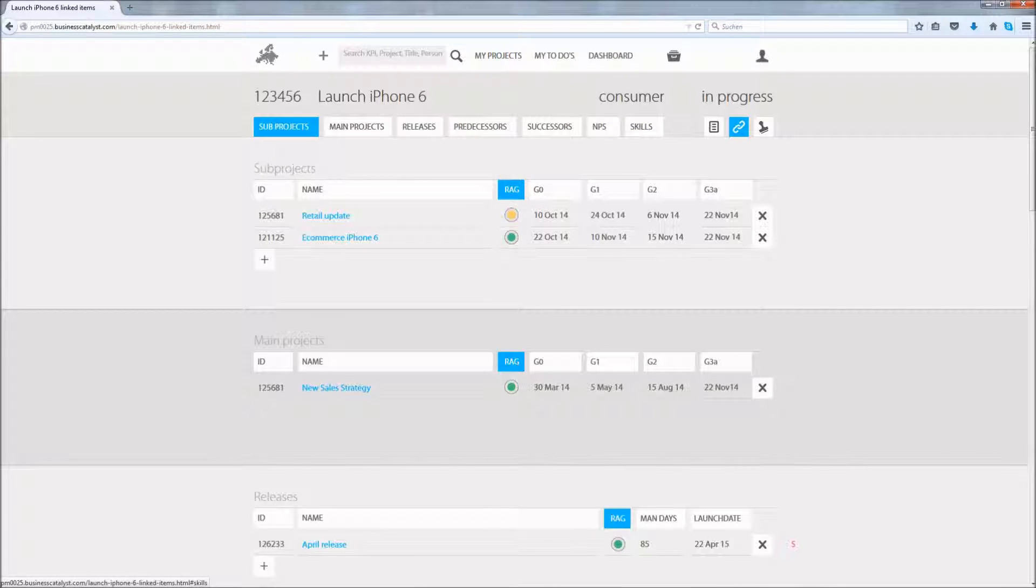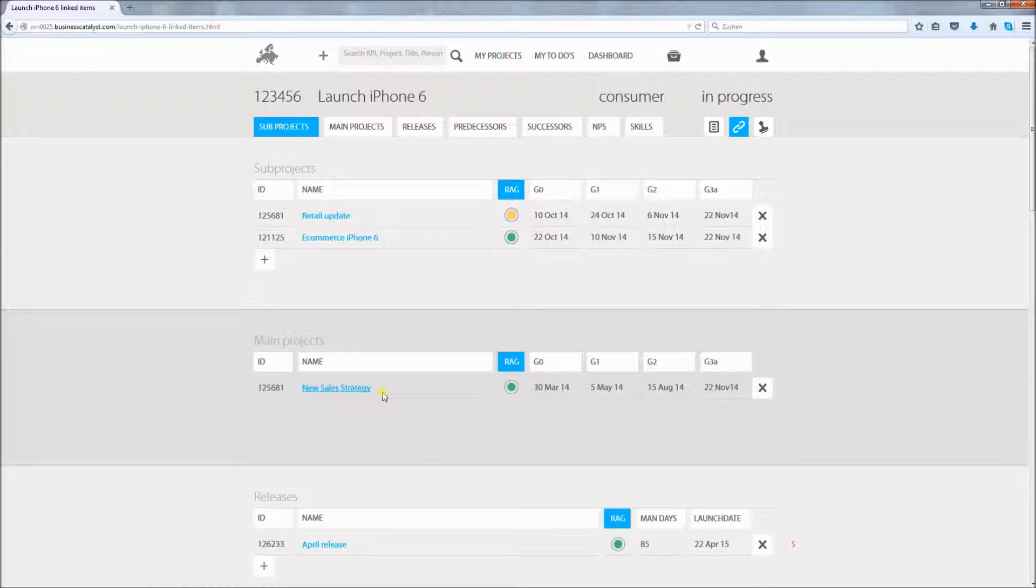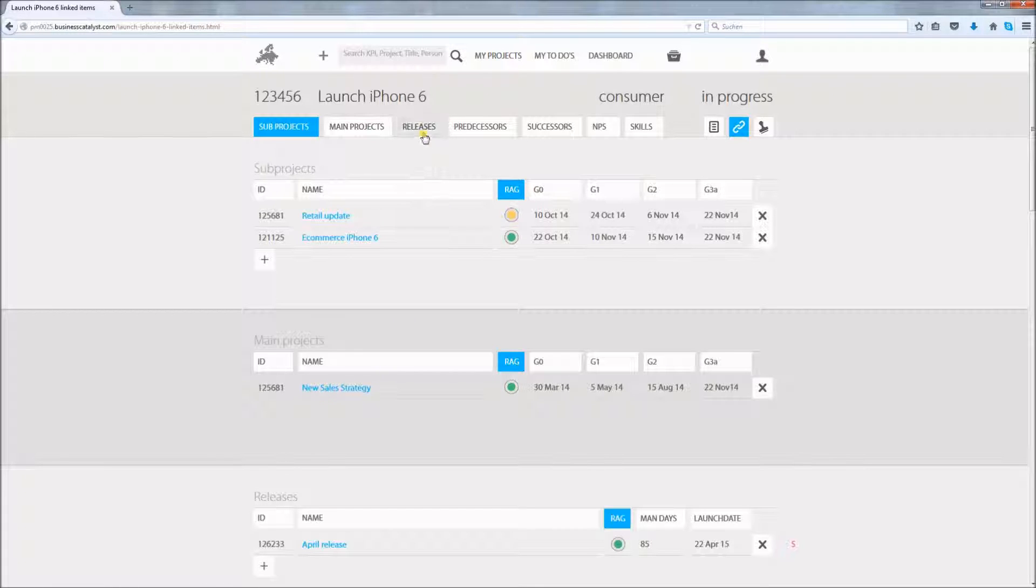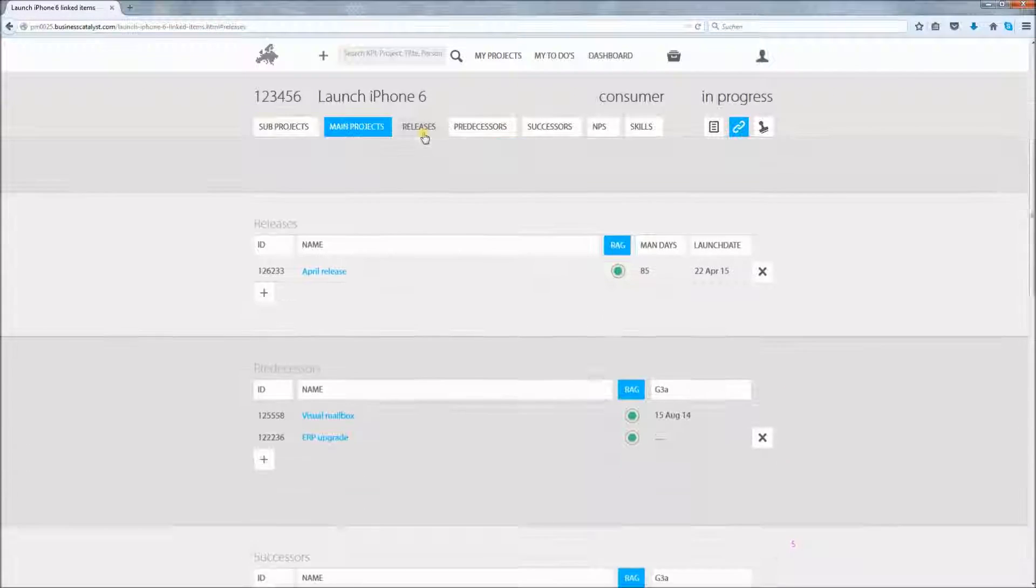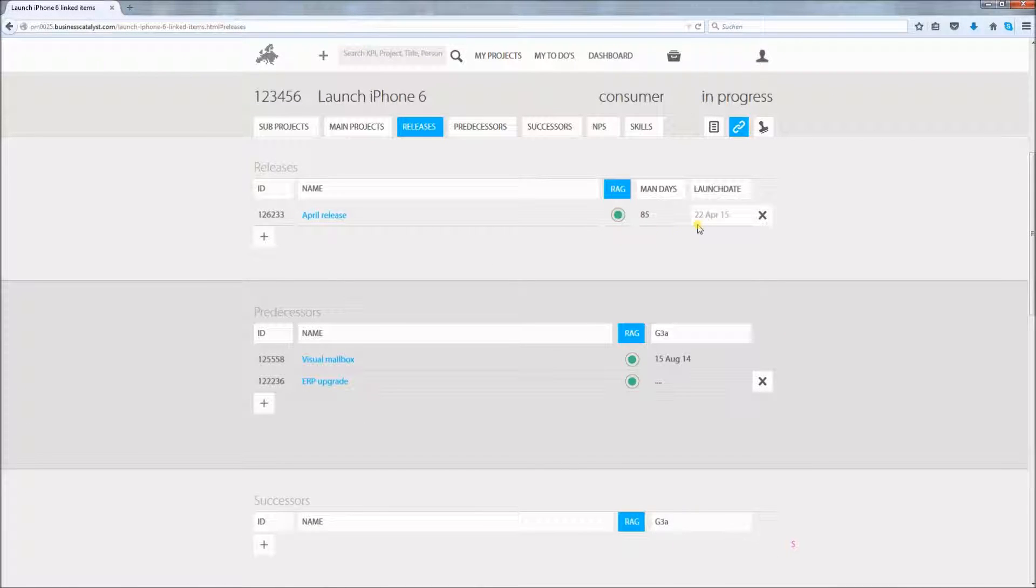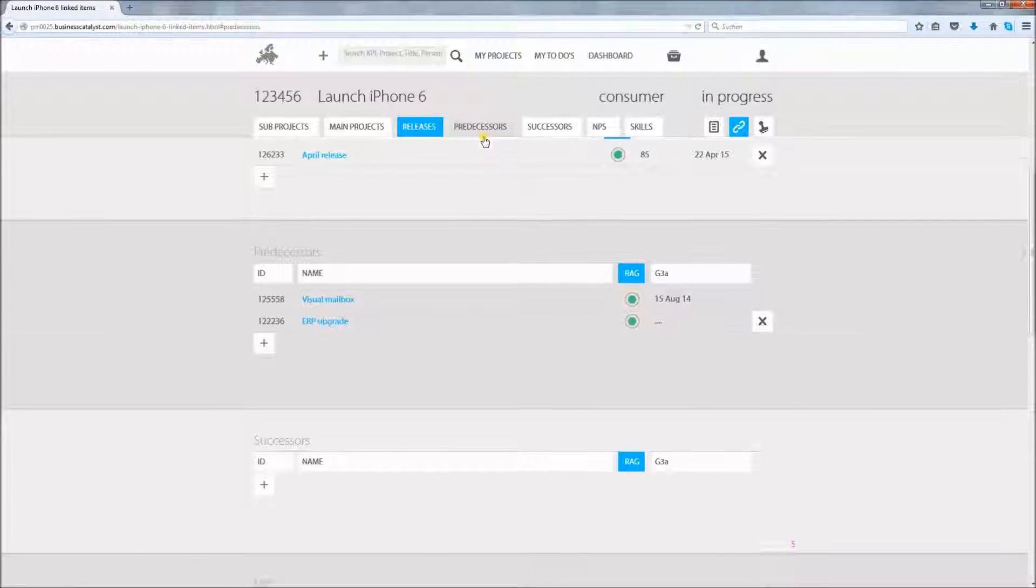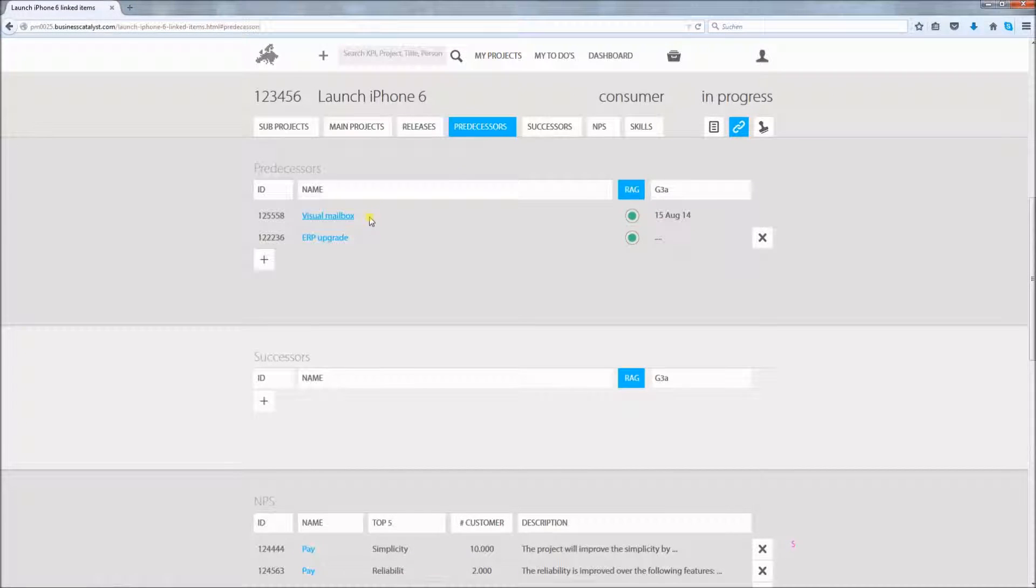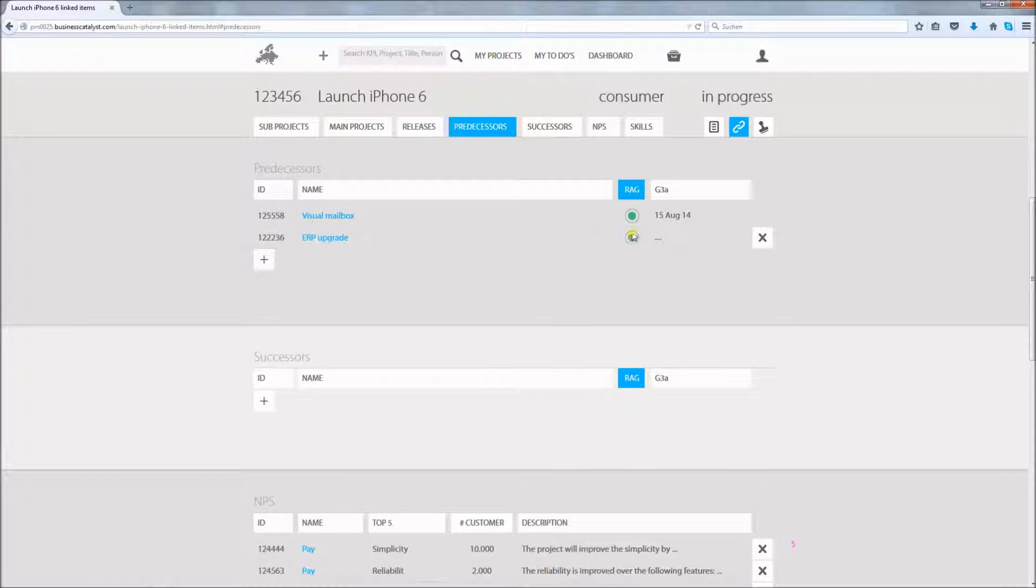The project has two subprojects and belongs to the main project New Sales Strategy. The project is linked to the April release which will launch on April 22nd. The development effort in this release for this project is 85 mandays. The project's Visual Mailbox and ERP upgrade are predecessors. Good to know that both their status is green.